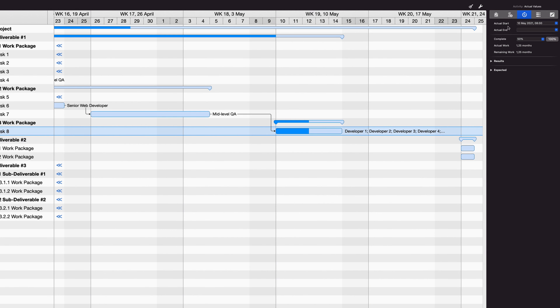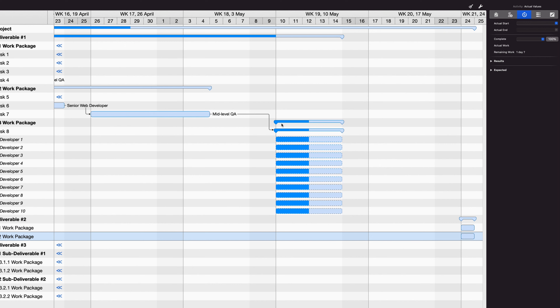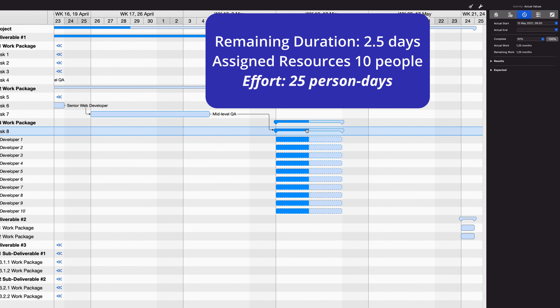All project management software allows you to mark the percent done for each task, but be mindful: you're marking percent done of the duration. Behind a five-day task, when you're 50% done, you may have 10 or 20 people doing their work — the efforts are huge. You need to control how long it will actually take that group to finish the task in calendar days. Many project managers fail their projects because they track efforts done but the task isn't finished on time.